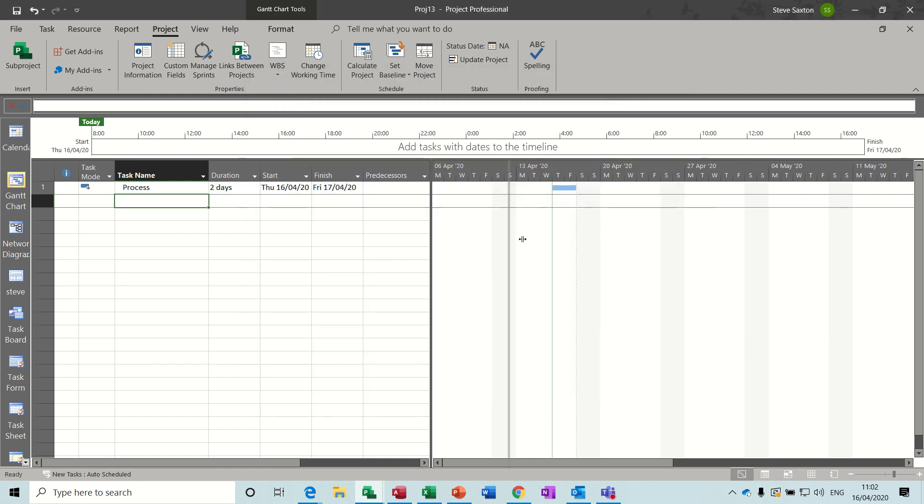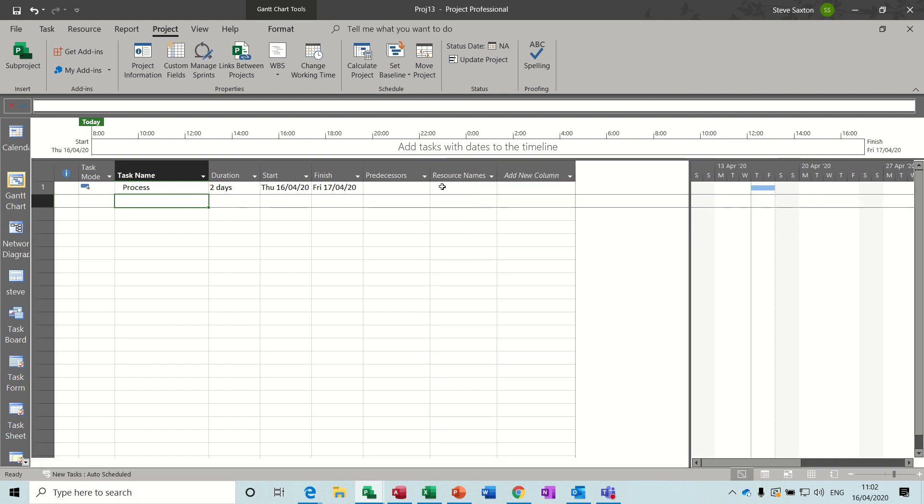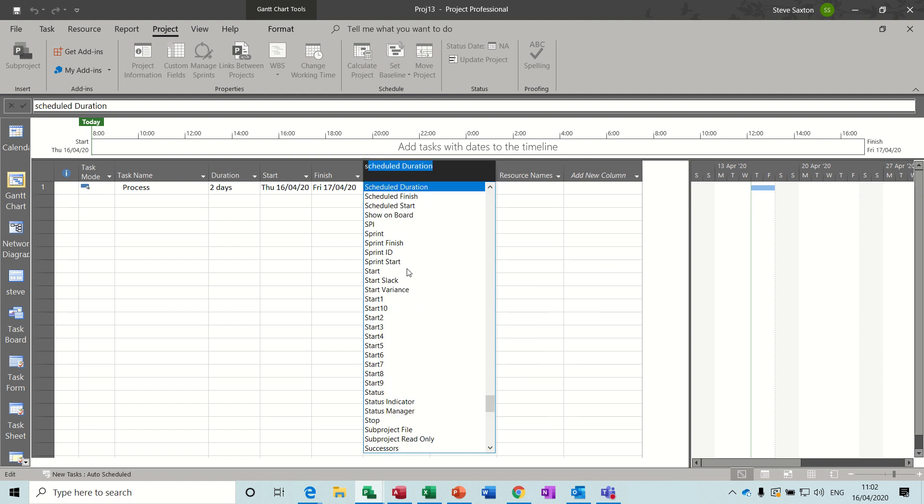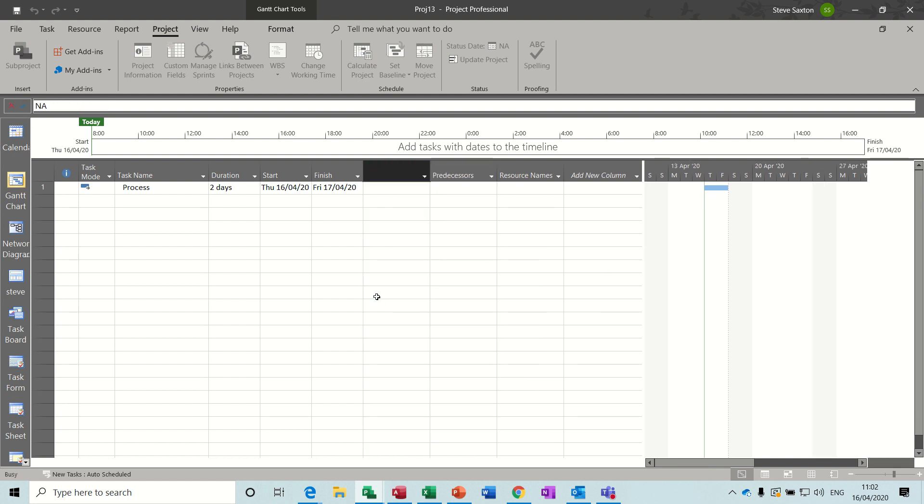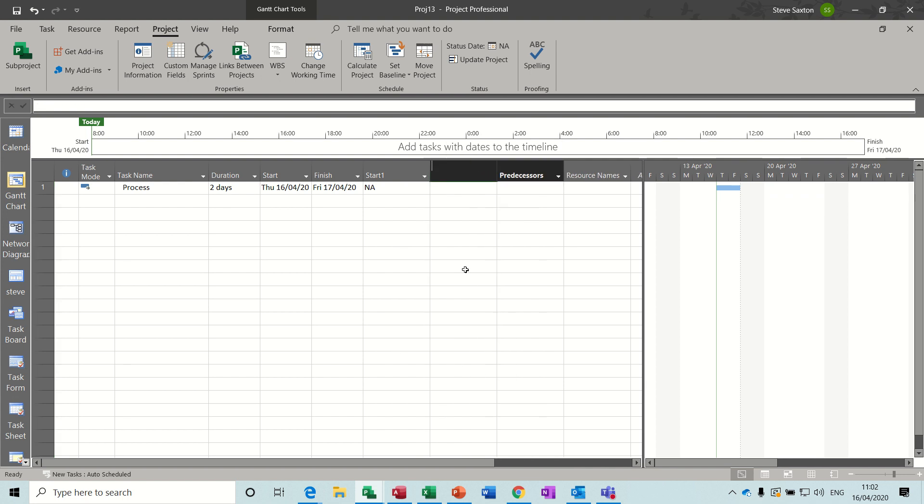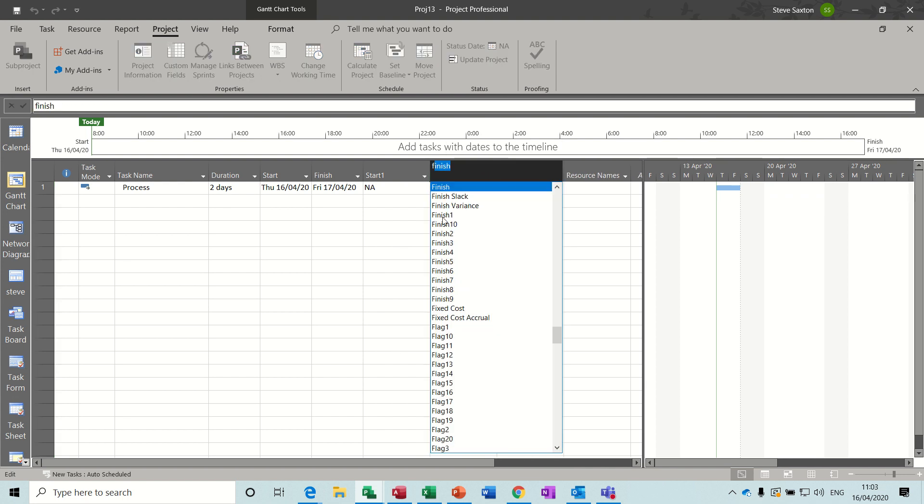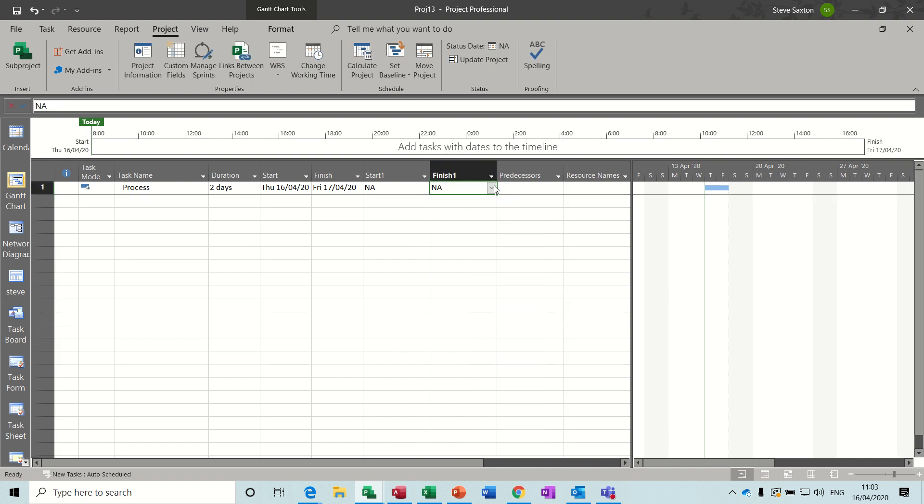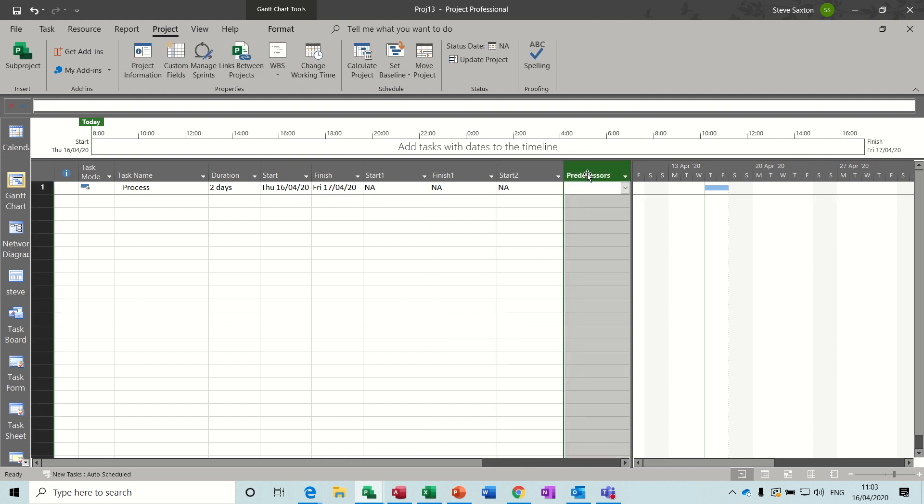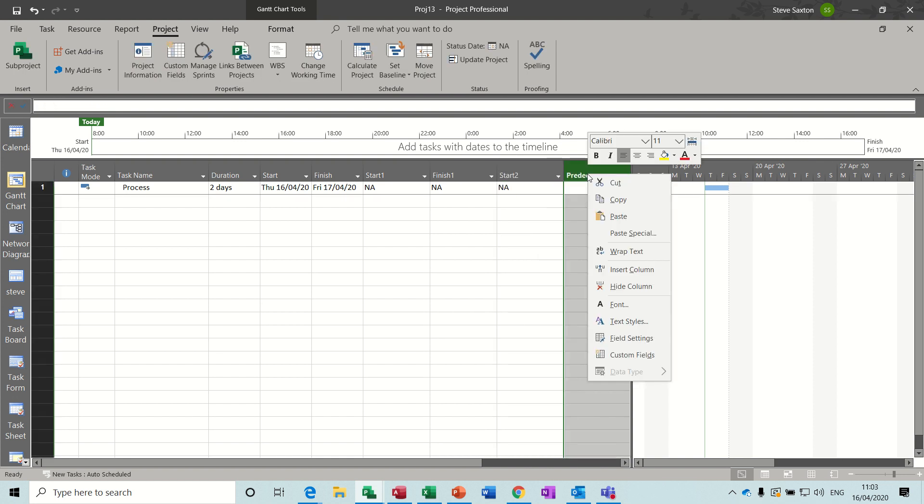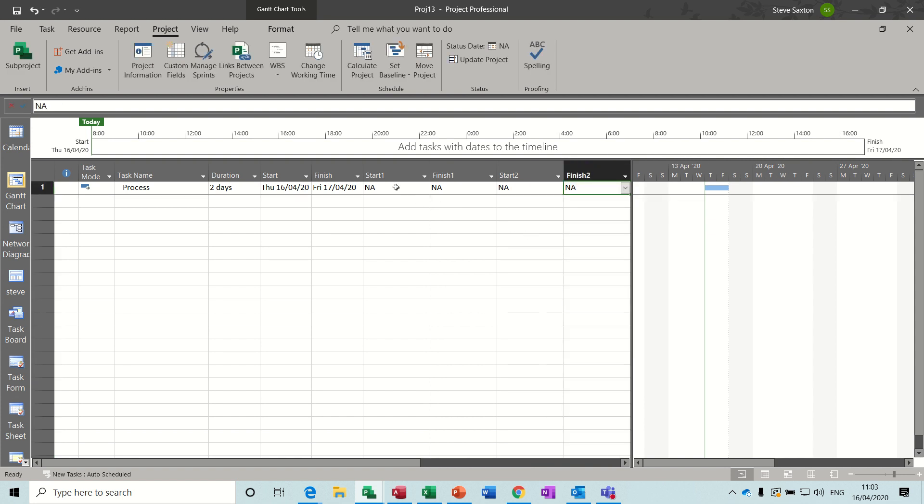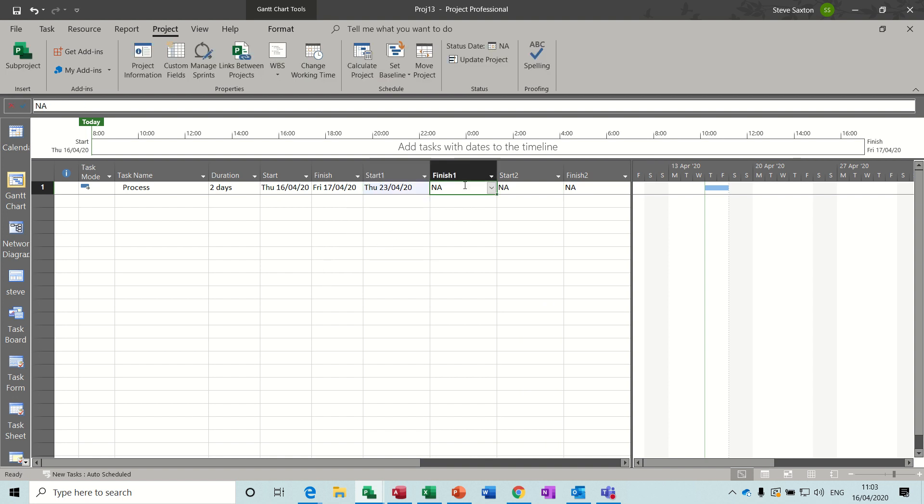Click OK to that. Now at the moment there's nothing there because we haven't actually done anything, we need to insert those columns. So insert column, right click at the top, insert column, type S to get to the S's, you want Start1 and then Finish1, and then you want Start2 and Finish2.